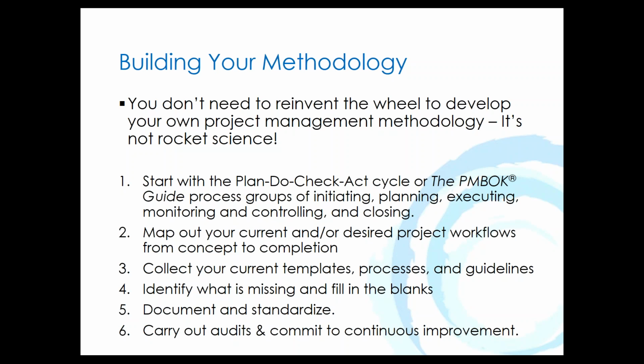Also, go and collect your current templates, processes, and guidelines. You may be surprised. You've probably got a lot more than you think you do. I haven't worked with any clients to date that don't have any at all. And often people want to start the process by throwing them all out and starting afresh. Well, from a change management point of view, it's much better if you use your existing IP. So go and find those current templates, processes, guidelines, software, do a stock take, list them all. Then you can figure out what you've actually got.